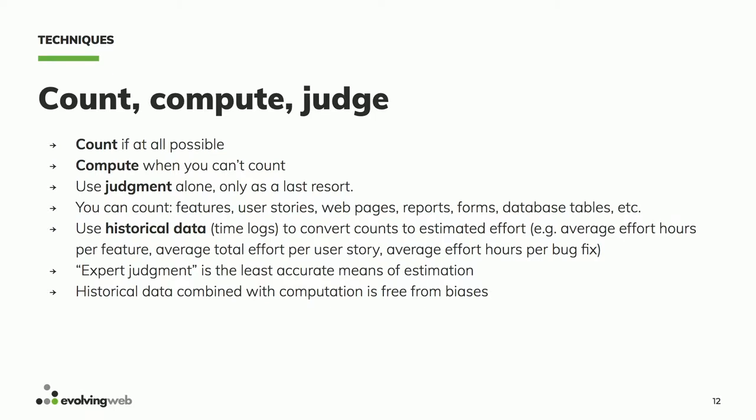So one is count. One count that I do for every new project that comes in is I go to Google and I go to site: myclientdomain.com, if they have an existing website, that is, and I just see how many results Google returns. That's not working very well recently. They've changed it so that now it's more of an estimate instead of a count, but nonetheless, it's still a very useful index. It'll tell you if it's a 50-page site, a 500-page site, a 50,000-page site, although beyond a couple of thousand, it stops being accurate, so that you could be off by a factor more. We also have a crawler that we sometimes use for these things, and there's other tools.